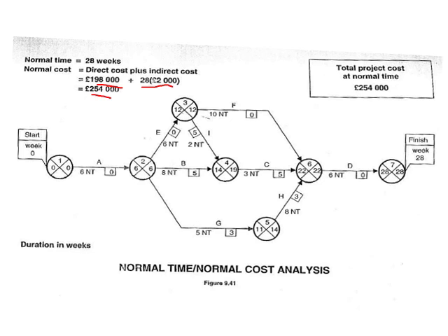What they did is they just put in the time durations, and then they had a look at what the longest path is to see what the duration of the actual project is. So a simple way of doing that is starting from the back. I'm going to mark that in green, and going backwards, looking for the longest path. Okay, so first item is D, that is on the critical path.